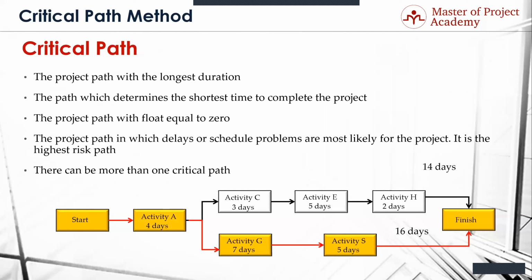Well, are those the right estimates? Could we move this somewhere else? You don't want to have, if you can, more than one critical path. Certainly if they're in the same general area. Now, if they're in total different areas done by total different groups, maybe there's not a big issue. But if they're tight together, you're making your life miserable. So you don't want to have that many critical paths.